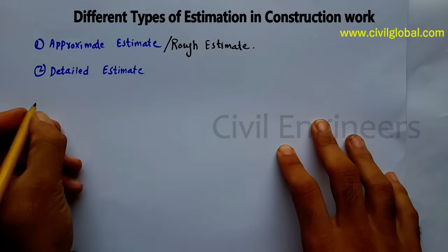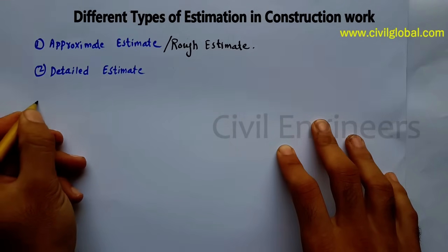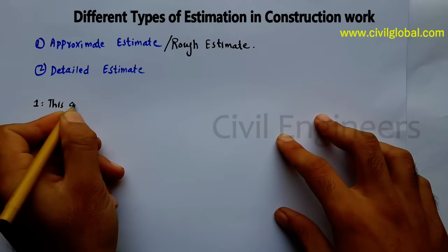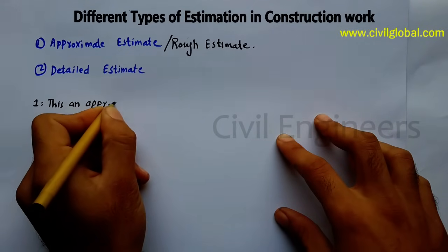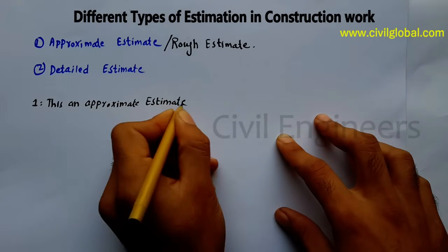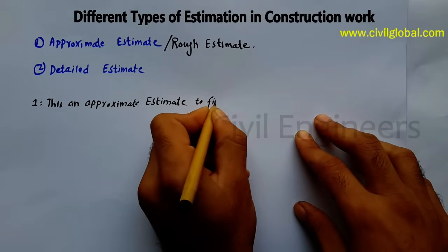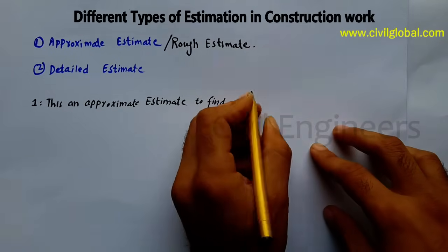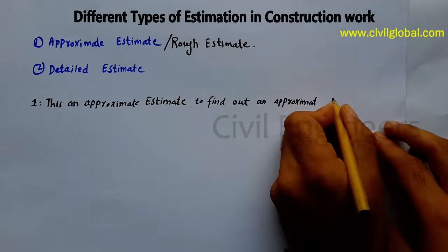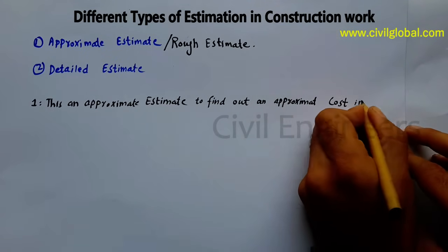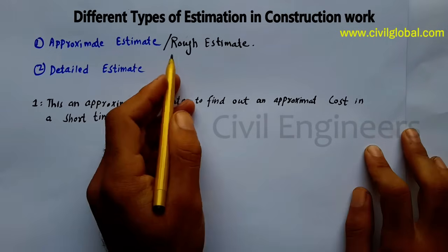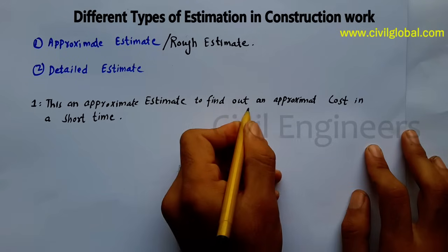Now let me define each one. The approximate estimate, also called rough estimate, is used to find out an approximate cost in a short time. This is a quick, preliminary assessment of the cost of a construction project without going into full detail.